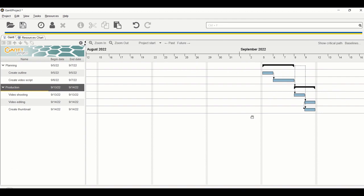You might notice the dates skip — for example September 2nd jumps to September 5th, then to September 9th. This is due to the weekend setting. By default, GanttProject assumes work only happens on weekdays. On weekends no tasks run, because in most factory or business environments weekends are rest days, and working weekends significantly increases project cost due to overtime.